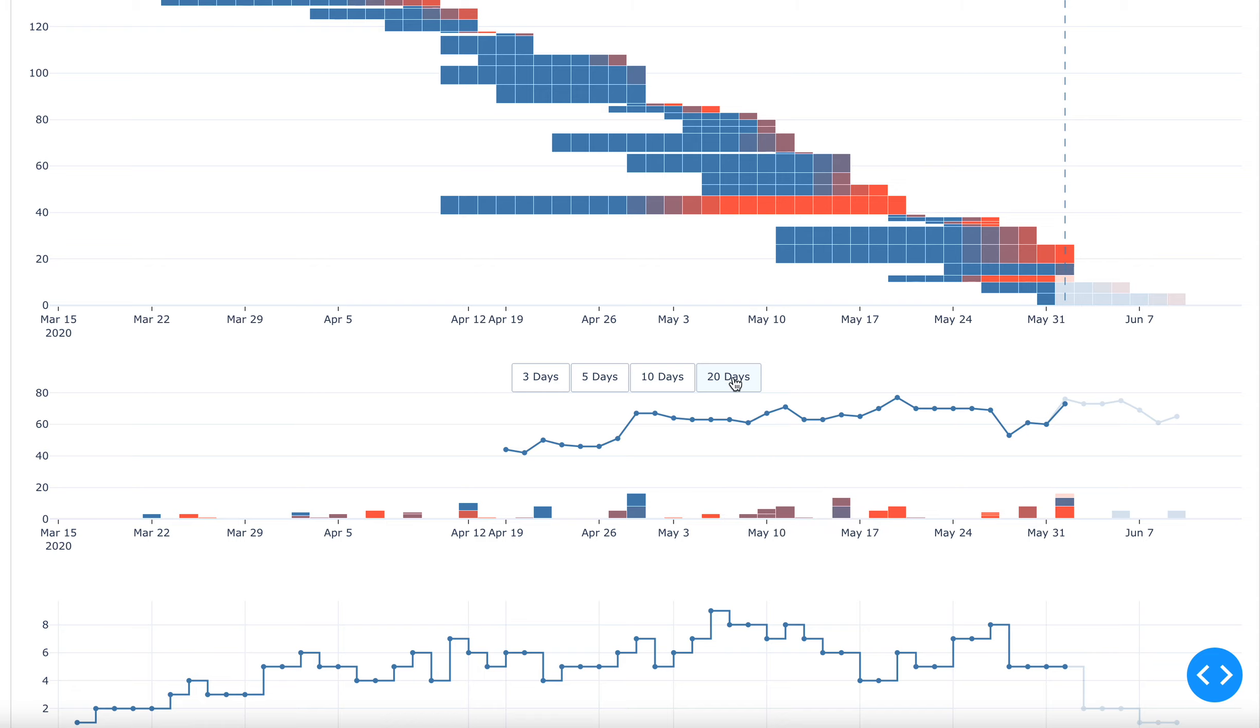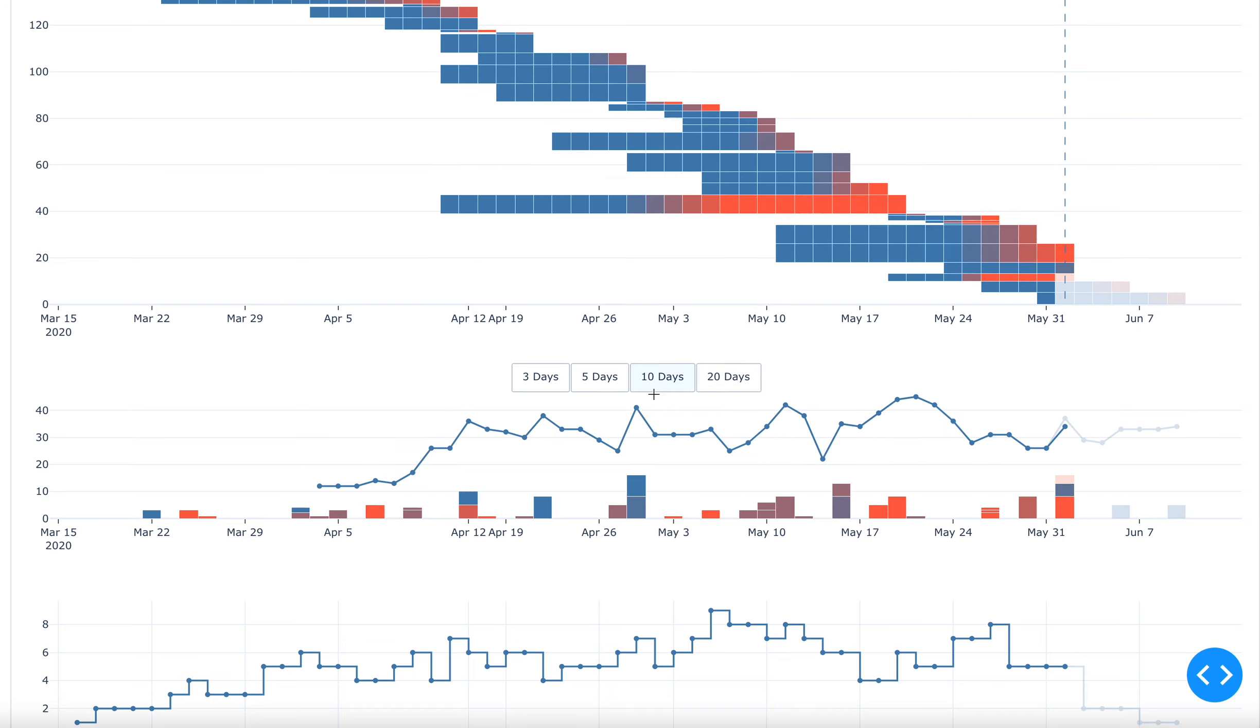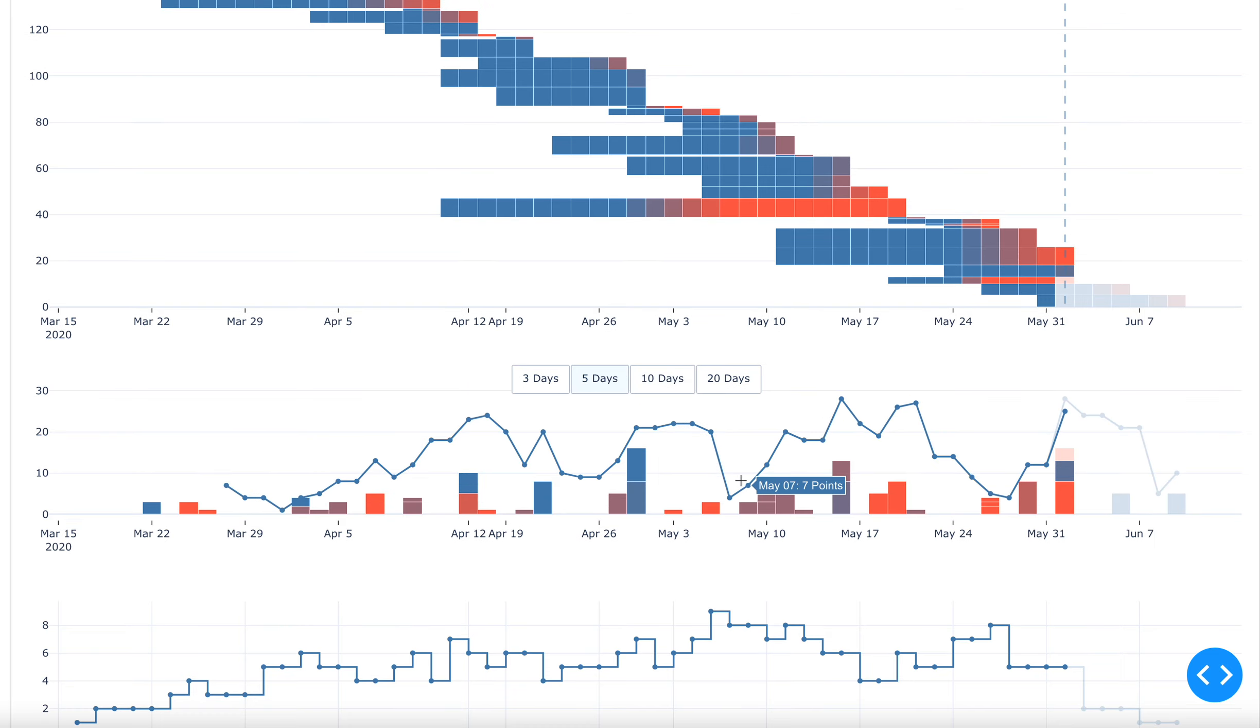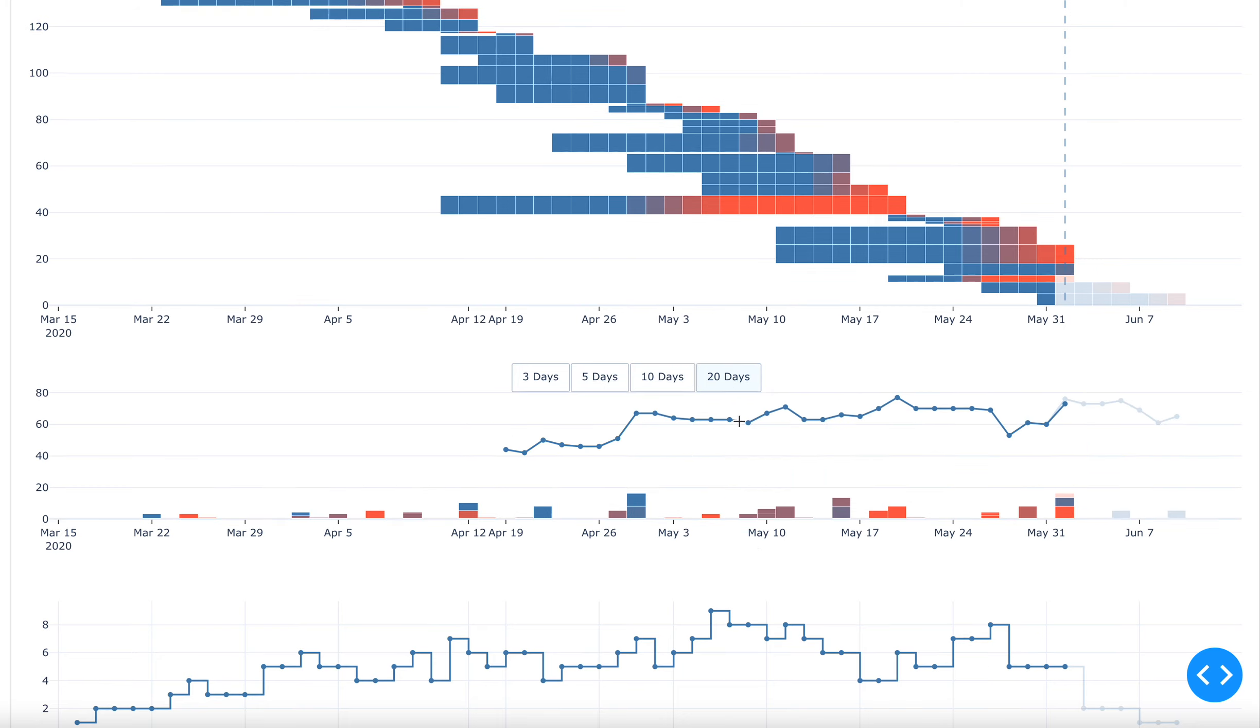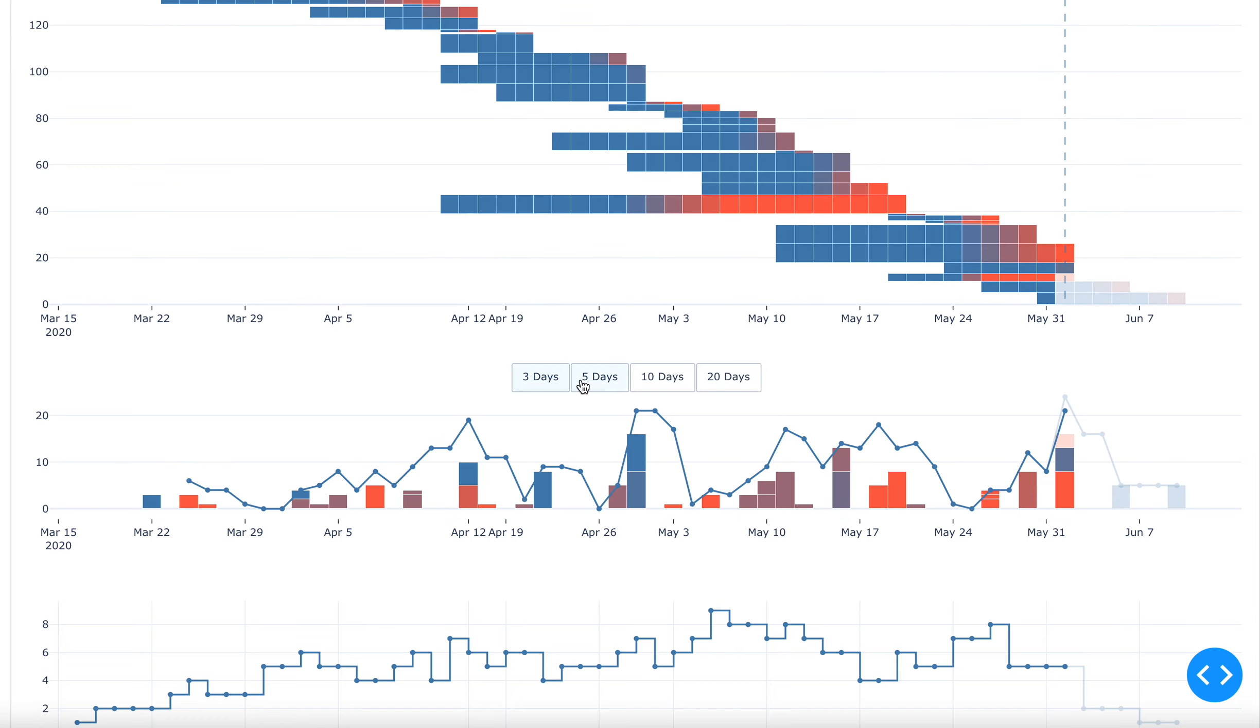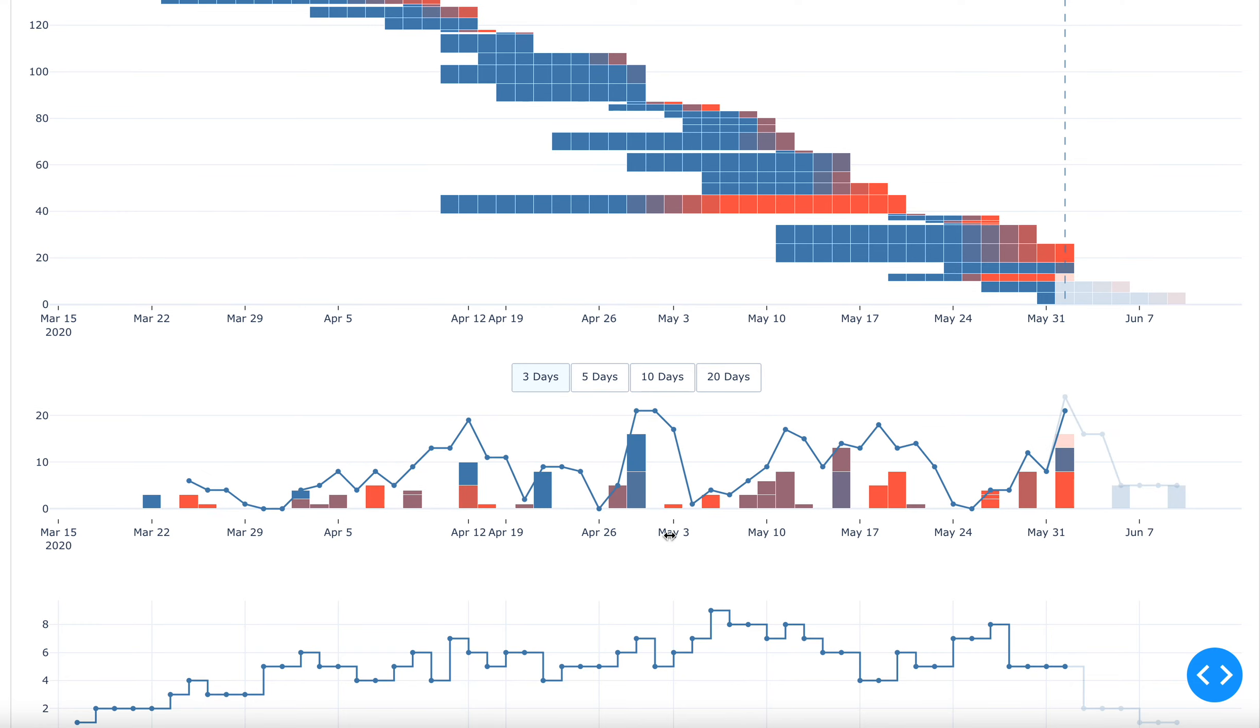And you can change the window size. So you can look at the longer term trend, like here where it shows a slight upward trend. And you also can look at more short term data. For example, here, the five day window. So one work week window that is more useful on a day to day basis to see short term things that may have an effect on the long term trend if unchecked or unaddressed. So for different things, I look at different windows.